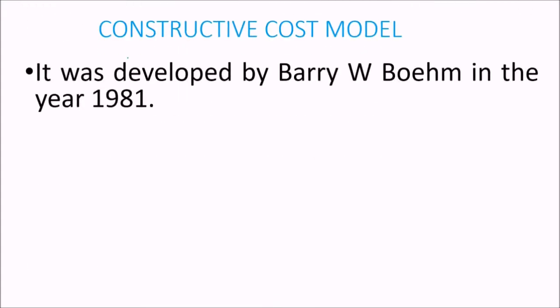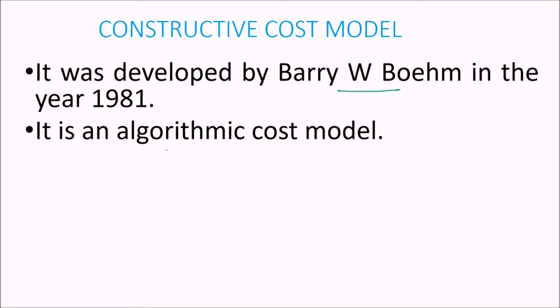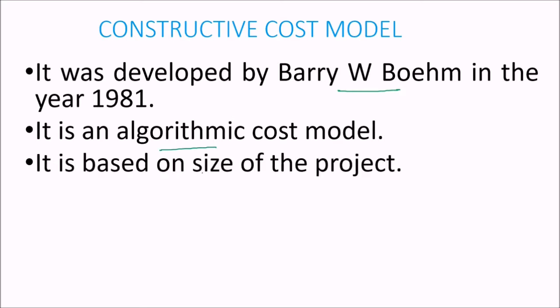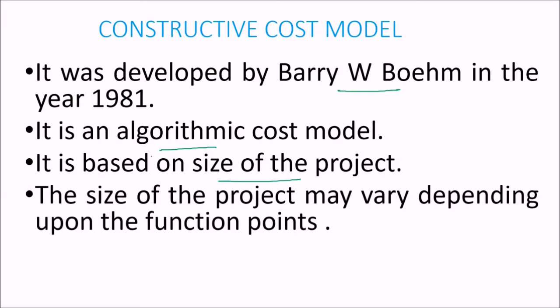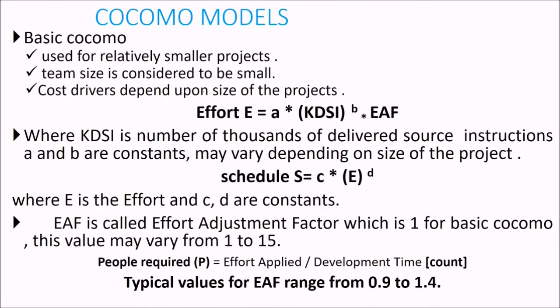So constructive cost model, let us see, it was developed by Barry W. Boehm in 1981. It is an algorithmic cost model. It is based on the size of the project. The size of the project may vary depending upon the function points. So COCOMO models, first is your basic COCOMO. It is used for relatively small projects. The team size is also very small. The cost drivers depend upon the size of the project.